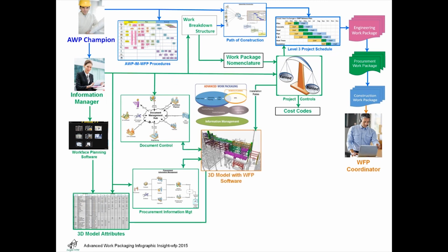One of the workforce planning coordinator's first activities will be to work with the information manager and the software vendor to populate the workforce planning software with all the elements that are being created in detailed design and fabrication. This brings the 3D workforce planning software to life, at which time we start to see the full potential of project information visually represented in a 3D environment.